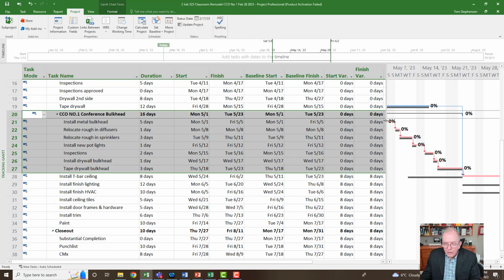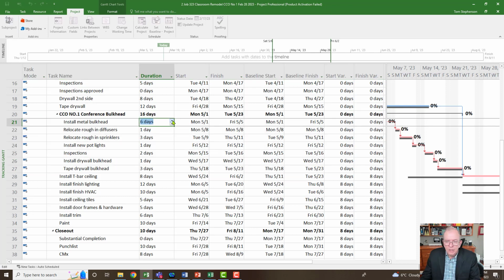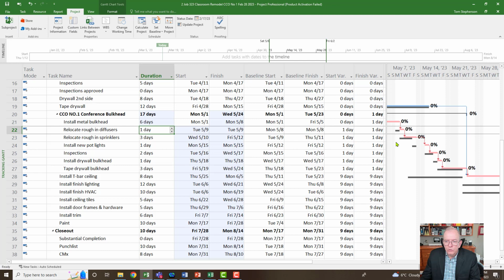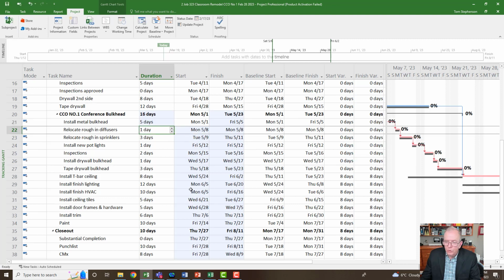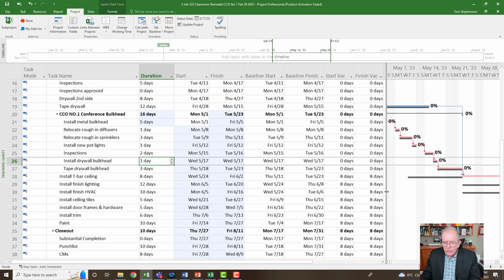And there you go. Now you've got a bottom bar, and now when you change something, it will show you a variance. So if this becomes a change order and something changes here, it will show you the variance, not only on the overall project, but the variance on the change order itself from when you added that in, which is very cool from that perspective. Okay, so that's pretty much what I wanted to get across today with the change order.